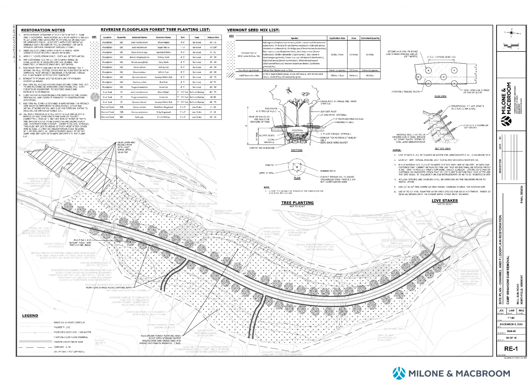So looking at the restoration plan, the contractor will be responsible for providing and planting the ball and burlap sized trees. There are additional trees listed in the planting table that the contractor will not be required to provide, and those include the bare root and live stakes. Others will be putting in the bare root trees and live stakes following construction.